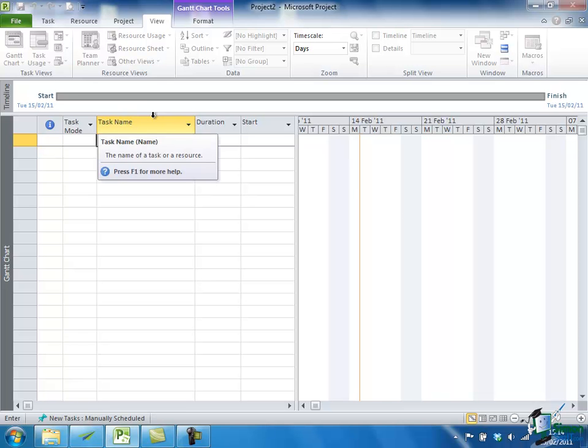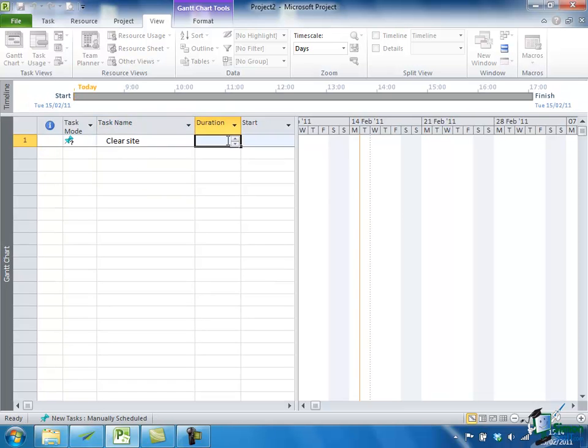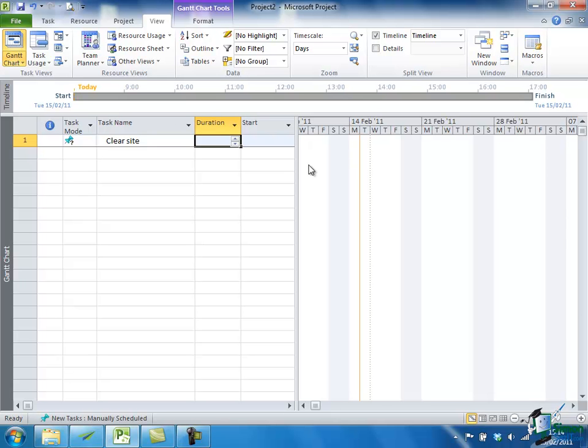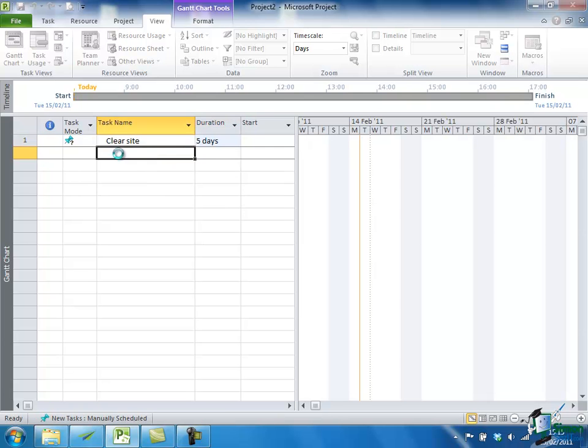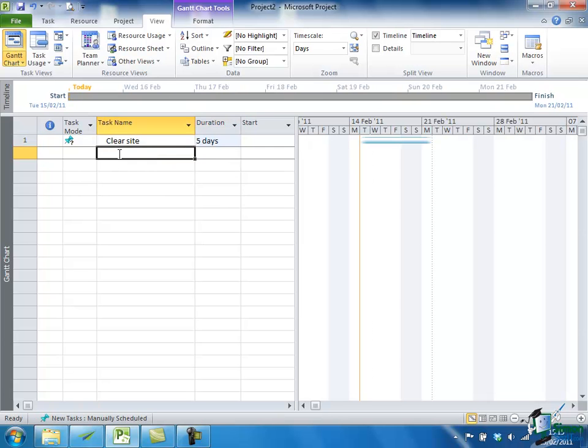Now having typed there, if I then click in Duration, I can actually say how long I think that is going to take. If I was really a house builder, I'd know exactly how long I intend that to take, but I'm going to allow myself a week. These little rollers here I can use to increase the duration of the task. So I'm going to say that's five days work, and then I'm going to click Ready to Start the Next Task.